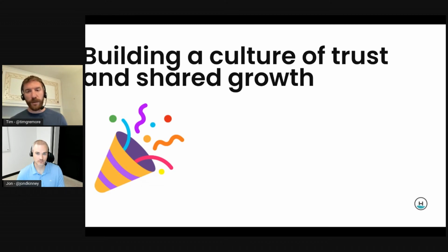John and I are coming up with a list, and that list kept growing, of ways to build trust. The one way that I've found effective, that I've not only received, it's built trust with me, but also that I've used in helping others, is in the middle of a sprint, if you're working on 2-week intervals, take time to reevaluate the current sprint commitments.